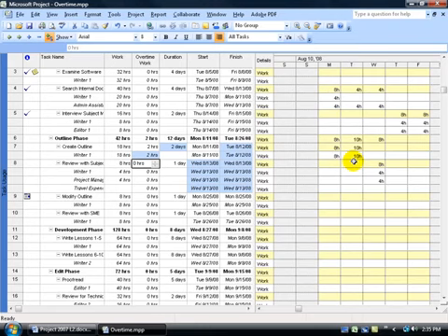Now you could say, well, why can't I have 1 hour on Monday and 1 hour on Tuesday? Well, as far as project schedule and budget calculations are concerned, it doesn't matter when the overtime hours are worked, only that they are worked. Okay, let's go ahead and hit undo a couple of times so we can go back to where we were, the original 16 hours,